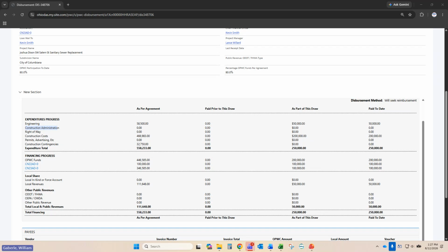It is the ID that they're provided when they register with OhioPays. And that way you can make sure that they're squared away with that ahead of time and head off any problems that you might have down the road as far as getting it processed promptly. Because if they're not set up with OhioPays, or they have not changed their data with OhioPays, that can cause problems with us getting them the money.